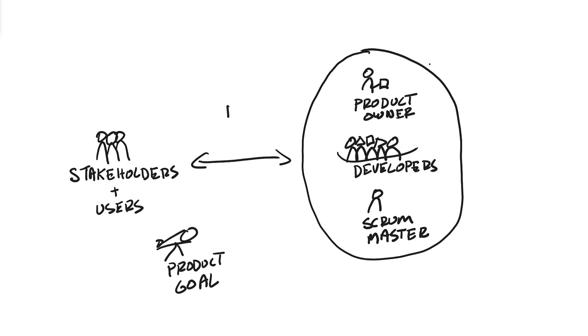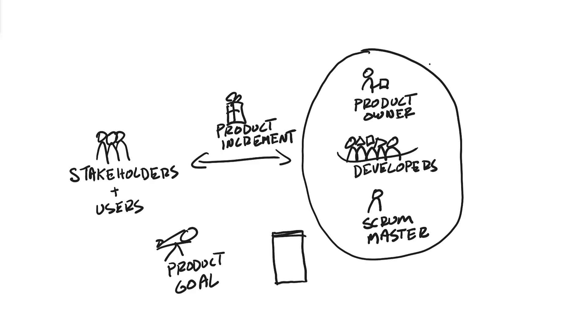The Sprint Review is about getting feedback from the stakeholders and users on the product increment, and then adapting the product backlog accordingly.